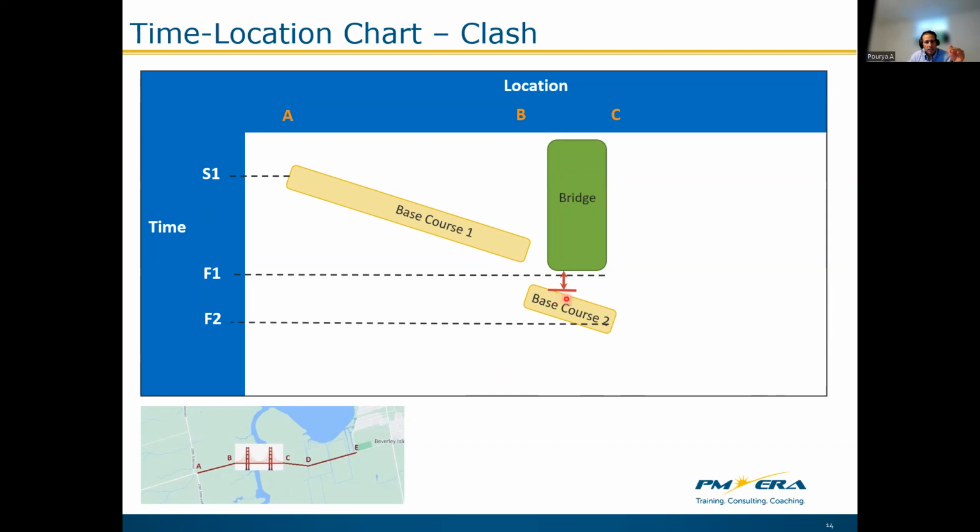This method prevents the clash. But on the flip side, the resources should be utilized elsewhere during this time buffer, once the base course activity 1 is finished and the base course activity 2 is started.